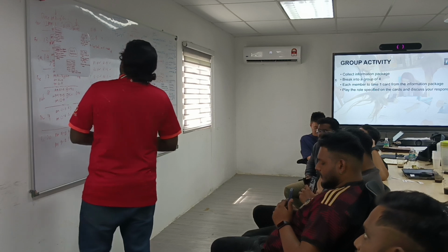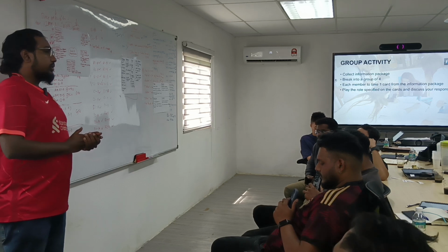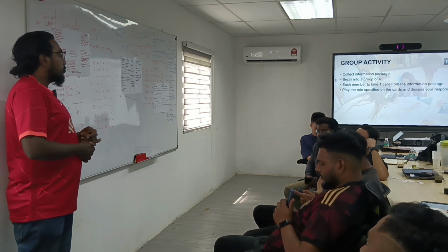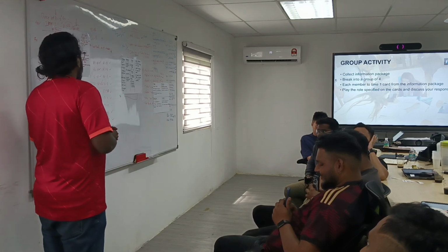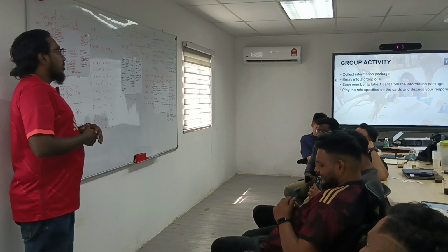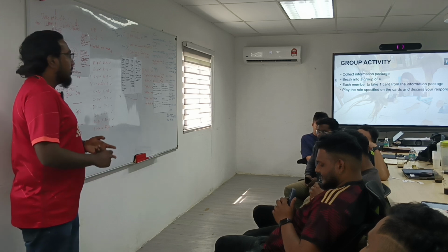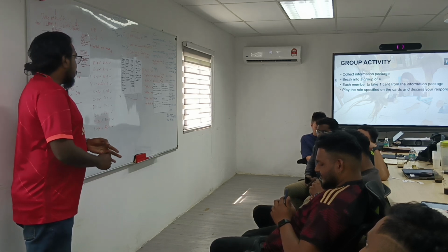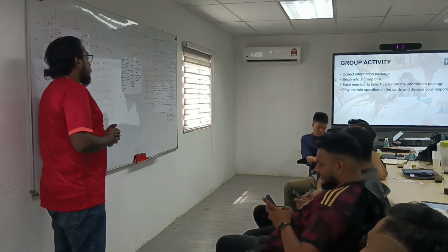And the next is TNC manager. Over here we can see Calvin, Nicholas, Rudy, Idaya, and then our new friend Denton. Denton, right? So all of them are in charge of the testing and commissioning. Testing and commissioning is after we have done the installation. Our site engineer finishes installation and positioning, and then we do the inspection with the consultant. After that, our TNC team will come in to do further testing and commissioning.